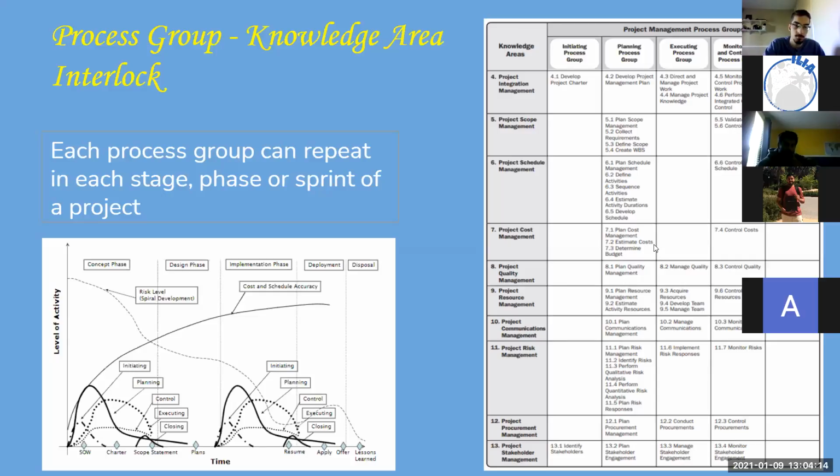I think the goal is to say yes, right? If you have this map close to you, you can literally follow this kind of approach and get to the end result, just like someone who's experienced in turtles and whatever's going on with them, and also knows project management, right? So the first thing you would do is develop a project charter. You'd say, okay, tell me, what am I authorized to do? Oh, okay, I'll give you $50,000 and 10 weeks.